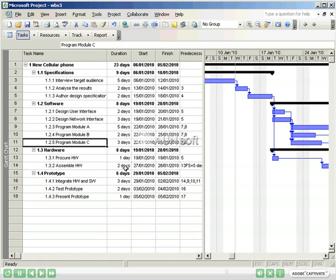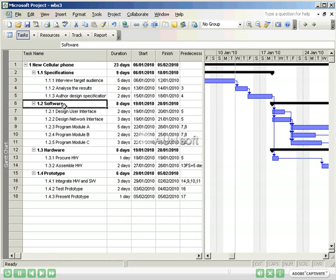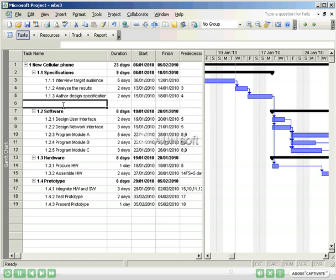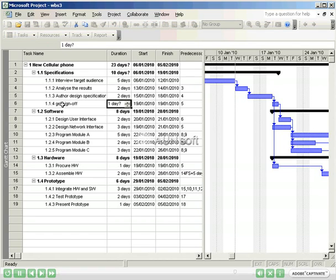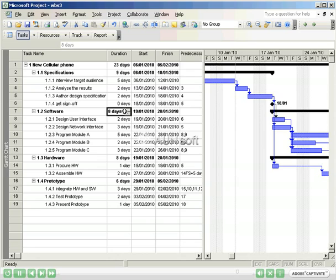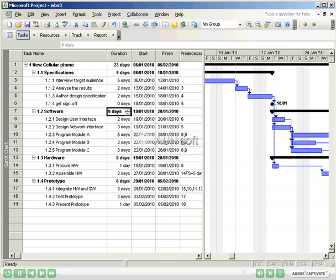To insert a milestone, select the task below where you want the milestone to appear, in this case, software. Press the insert key, and a new blank row is inserted. I'll type in the milestone, get sign-off, and put a zero in the duration column. Note that the predecessors all have moved down one to respect the insertion of the new task, and that the milestone is shown on the timeline view with a special character.